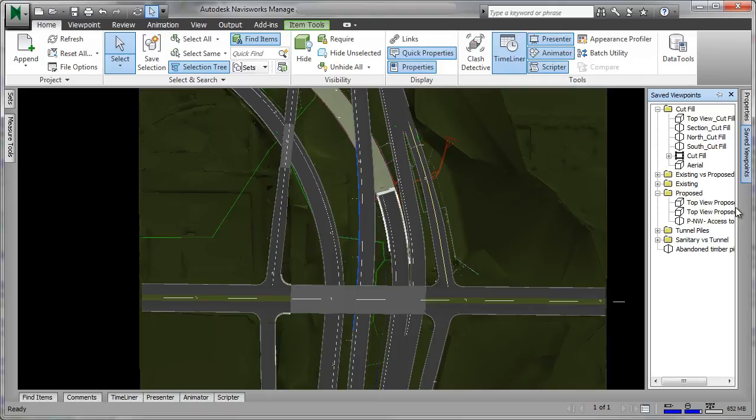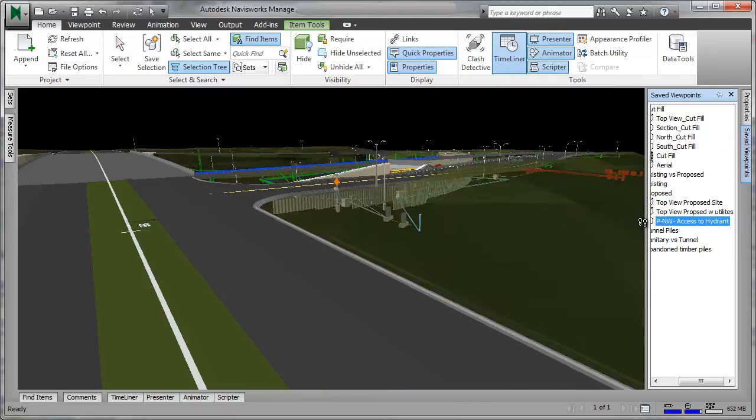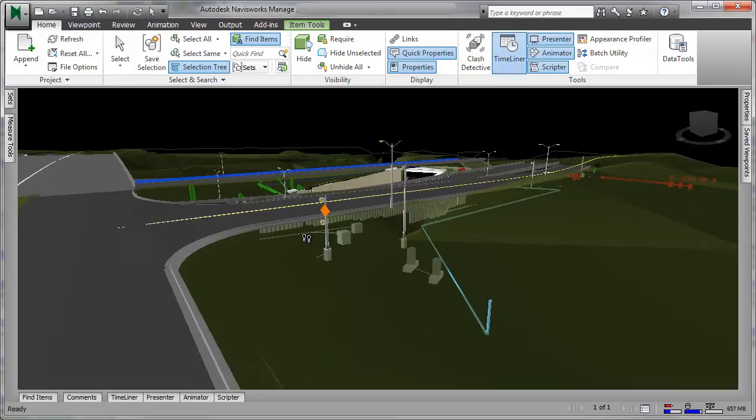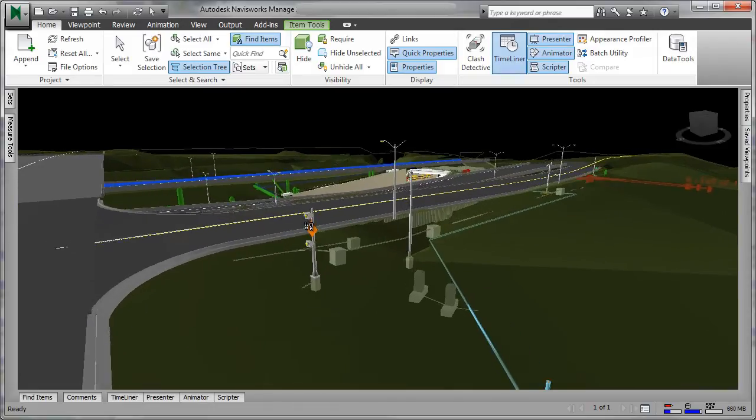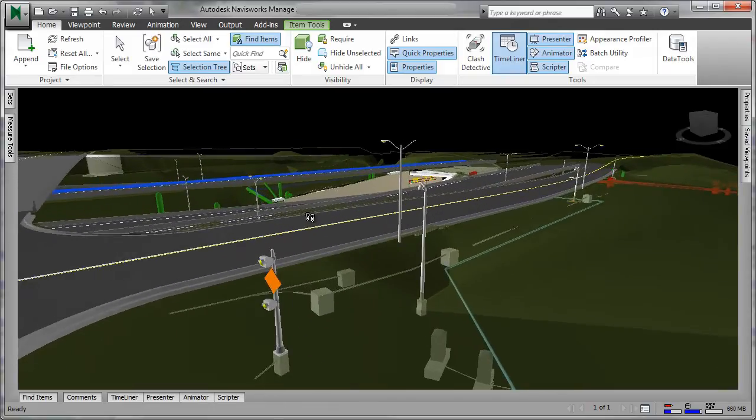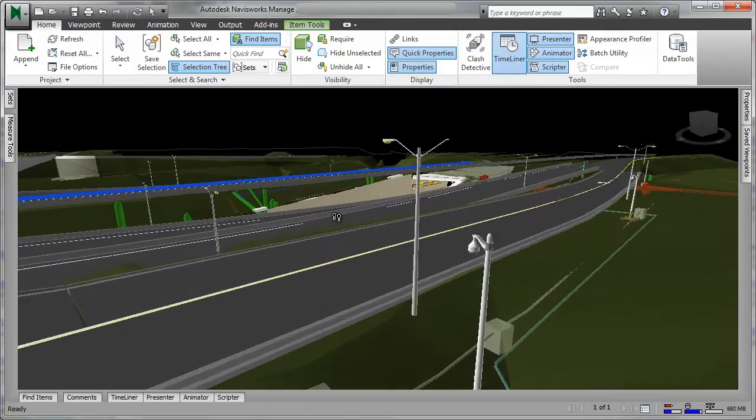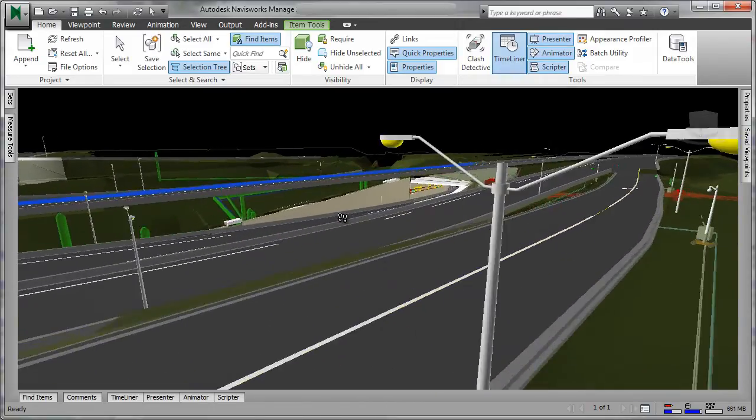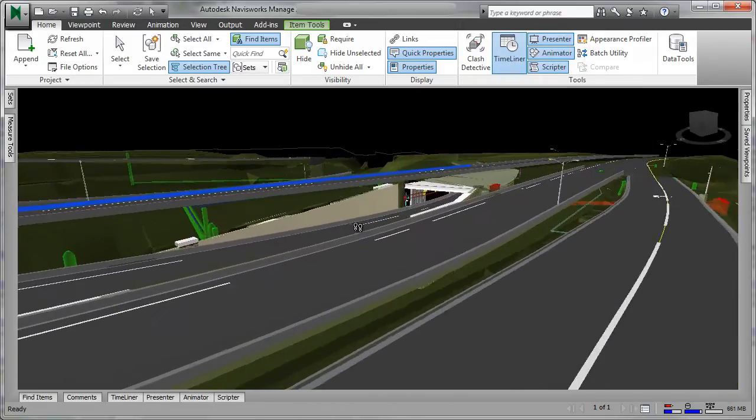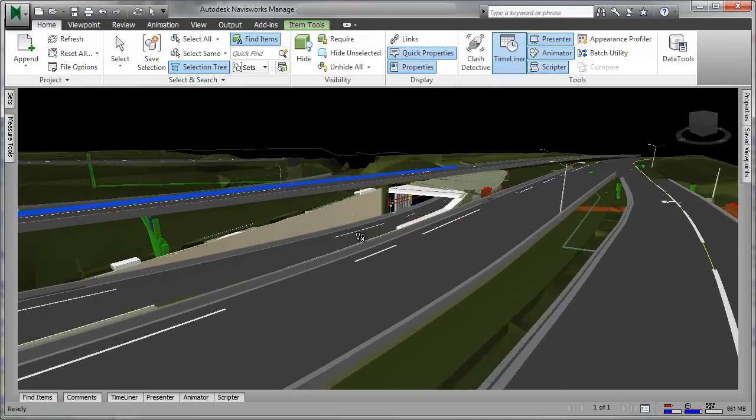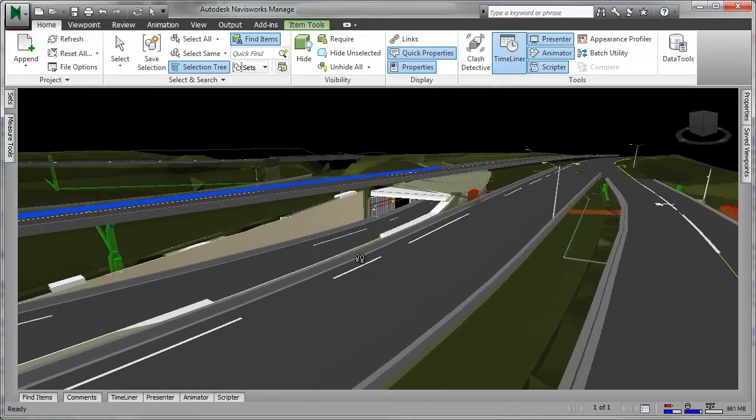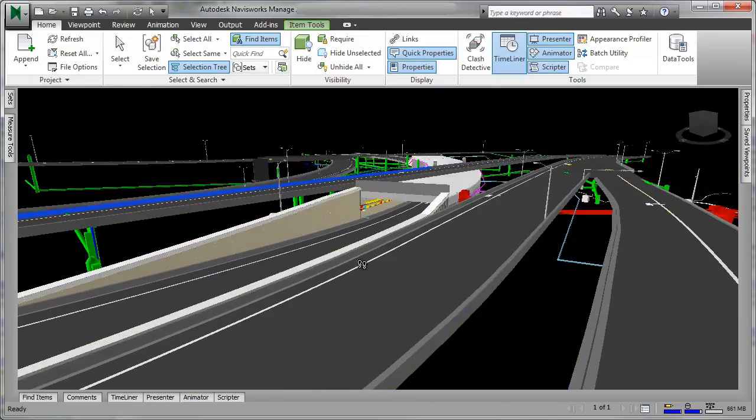Utilizing the rich 3D models produced in design, teams can identify and resolve issues virtually before breaking ground by visualizing projects holistically, modeling constructability, and performing clash detection.